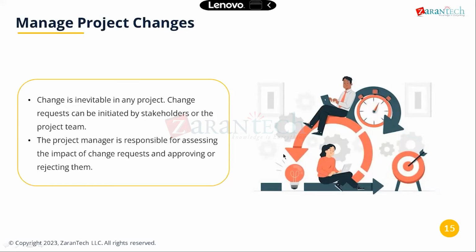Therefore, in the middle of the project, you're changing some of the scope or some of the requirements. And impact assessment, considering factors like cost, time, resources, and potential risk associated with the proposed change. All those can be part of impact assessment. Approval or rejection. Here we are talking about whether the change aligns with the project goals and doesn't adversely affect the project success. A change that significantly impacts the project constraints may be rejected.